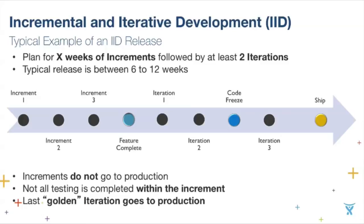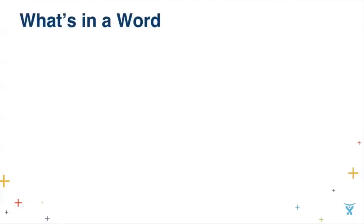The key features of IID are that increments do not go to production, not all testing is completed within the increment or iteration, and only the last golden iteration goes to production. You might look at this and say it sort of sounds like agile — but it's actually not, and I'm not just playing semantics. Semantics is what sometimes gets people in trouble, so let's talk about what's in a word.